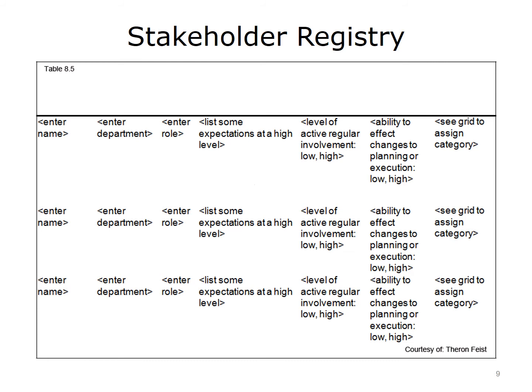Step 1. Identify all potential stakeholders and relevant information. Add them to the leftmost column on your stakeholder registry. Step 2. Identify and record their department or company, the role they will likely play in your project, what their expectations from the project may be, a description of their type and their level of influence, a measure of their power or impact, and what stakeholder category they fall into.